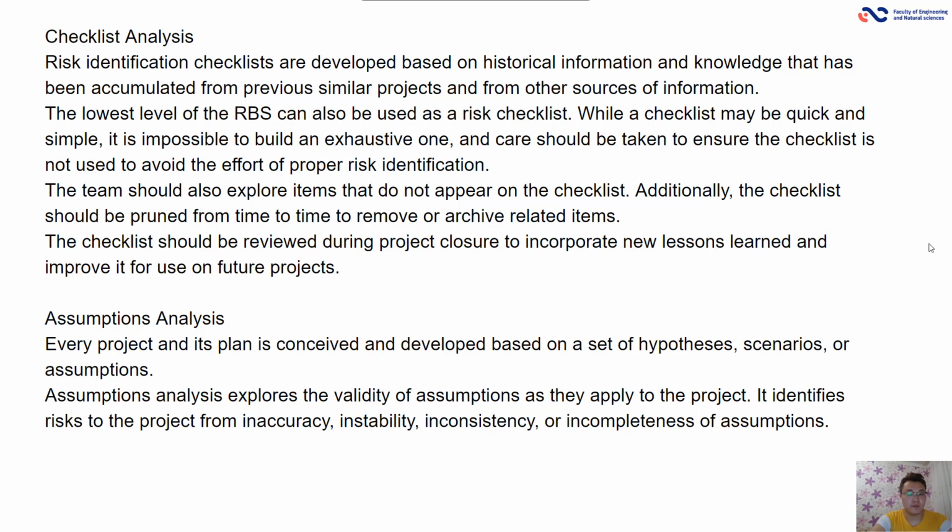It identifies risks to the project from inaccuracy, instability, inconsistency, or incompleteness of assumptions.